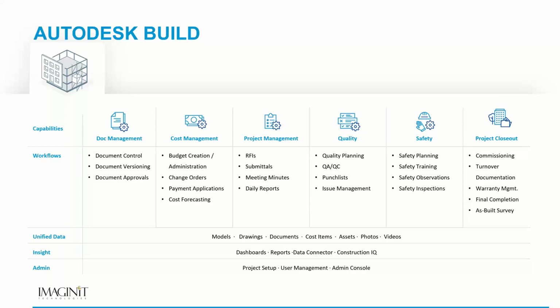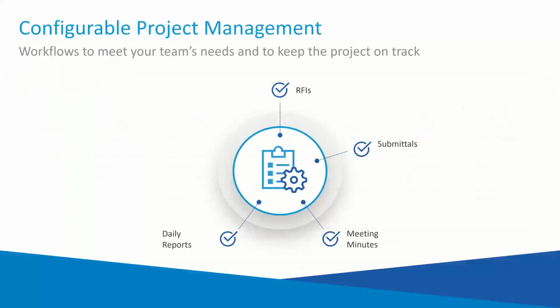Most of this is done via the tablet in the field, and that's really how this is all working. So as I said, there's a very powerful and configurable project management system for managing the RFIs, and a comprehensive submittal management tool. All these are workflow related. There are ways to manage all your daily reports that your site superintendent does. And this is what happened today. These are the people who are on site. This is the work they performed. Here are the issues we ran into. Here's the weather today. All of that is automated and put into very easy to digest forms and things that are part of the system.